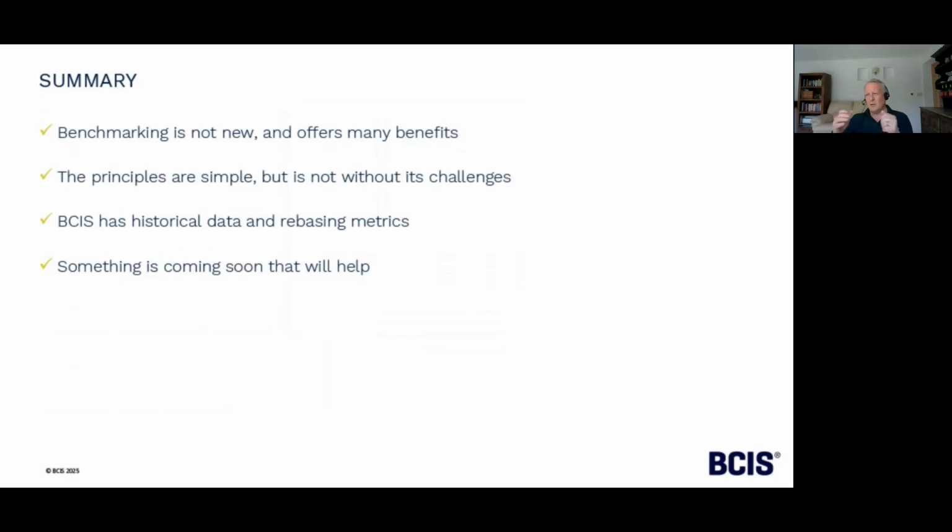Clients will change their mind, there'll be scope creep, there'll be things that we didn't understand, ground conditions, all that happens, that's life. But as long as we capture and understand the reasons for those changes during the life, then if we're getting better at capturing that data, that would hopefully start to feed into better risk analysis, better use of contingencies, and perhaps less strong need for optimism bias. Would that be a fair thing to say, Carl? Yeah, I think so.